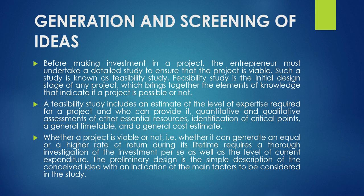A feasibility study includes an estimate of the level of expertise required for a project. First, it involves understanding what kind of expertise is required and who is going to provide it, what quantitative and qualitative assessments are to be done, identifying critical factors related to the project, scheduling everything, and generating a cost estimate.